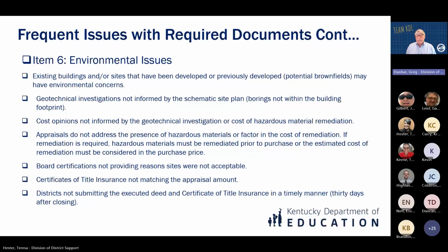Appraisals don't address the presence of hazardous material as a factor in the cost of remediation when determining the fair market value. If remediation is required, those hazardous materials must be remediated prior to the purchase, or the estimated cost of remediation must be considered and reduced from the purchase price. We've seen board certifications that don't provide the reasons that other sites weren't acceptable, certificates of title insurance that don't match the appraisal amount, and districts not submitting the executed